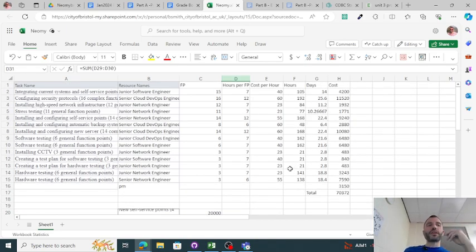In last year's paper, they actually said there were software and hardware faults found, like 6 software faults, 8 hardware faults, right? They haven't said that here, so I'm just going to assume that we're going to find that number of faults for both software and hardware, and I've added on that to the original hours.